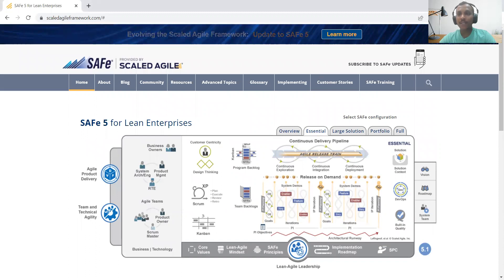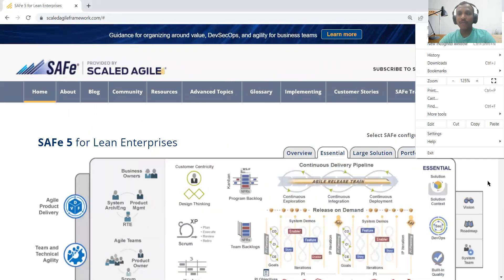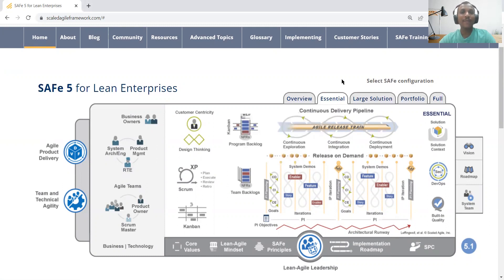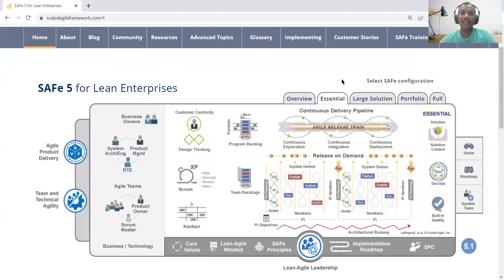When we go to the essential configuration — let me zoom in so that it will be easy to view — as the definition says, it is the most basic configuration of the framework and it provides the minimal elements necessary to be successful. Any agile implementation involves a product backlog as well as a team backlog, with a number of stories in the product backlog. Each team picks up the prioritized set of user stories and implements them in given two-week or three-week sprint timelines, doing incremental delivery. The same approach is recommended by Scaled Agile as well.